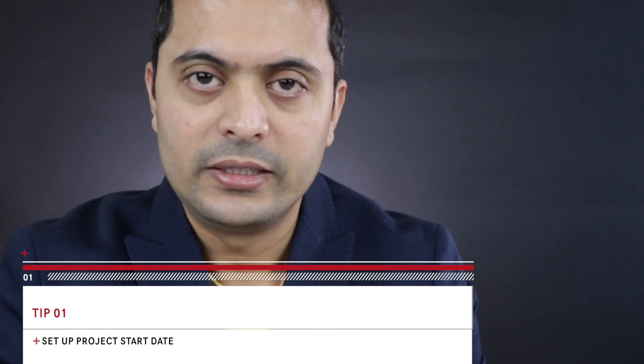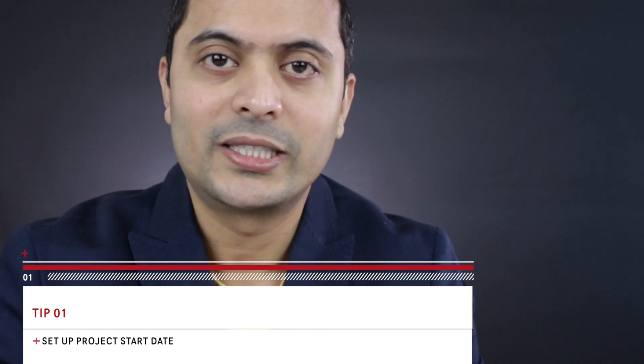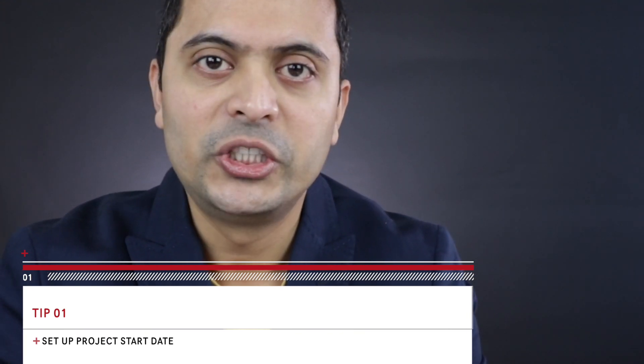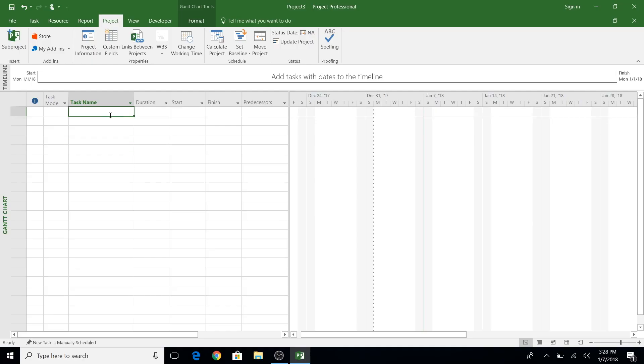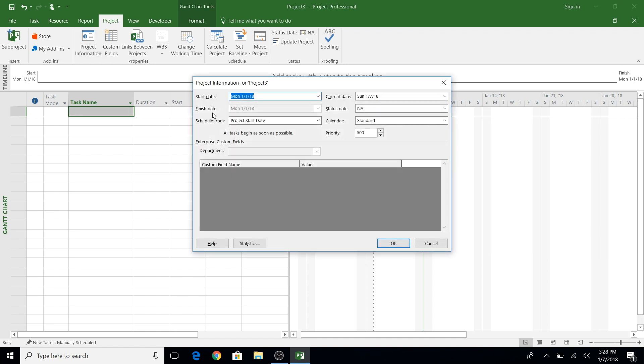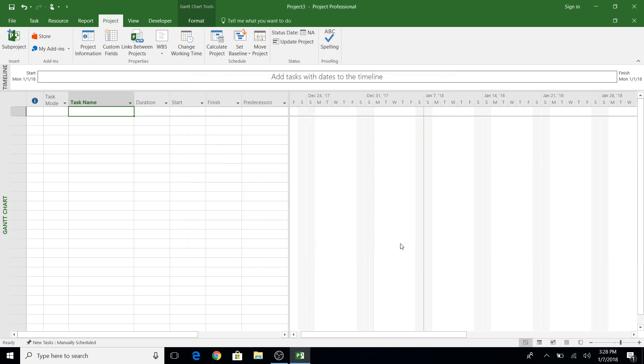First, always set your start date. No matter what, the project has a start and ending, so make sure you set your start date. I'll show you how to do that in MS Project — you have to go to the Project tab, click on Project Information, and then put the project start date in that field and you're all set. It's that easy.